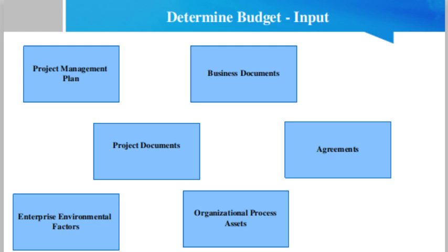the cost management plan. The cost management plan describes how the project cost will be structured. Then the resource management plan. The resource management plan provides information on rates, estimation of travel cost and other foreseen costs that are necessary to estimate. Scope baseline. The scope baseline includes the project scope statement, WBS and WBS dictionary.